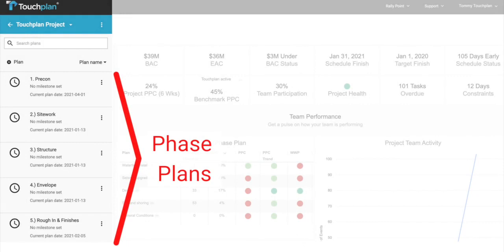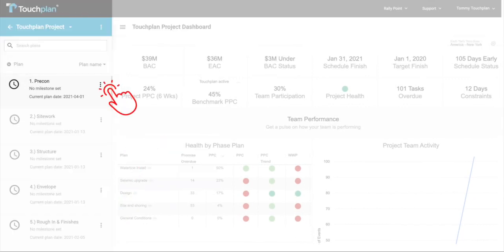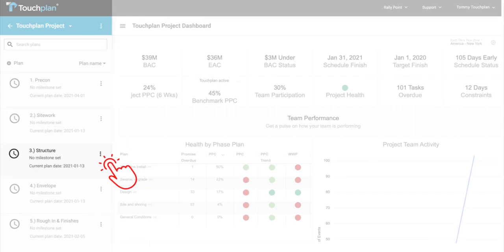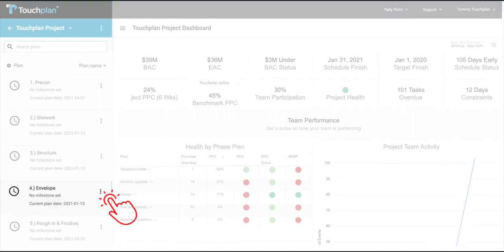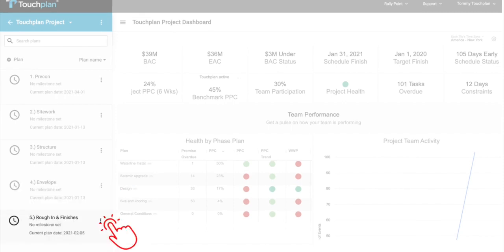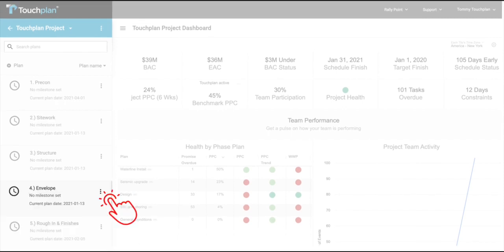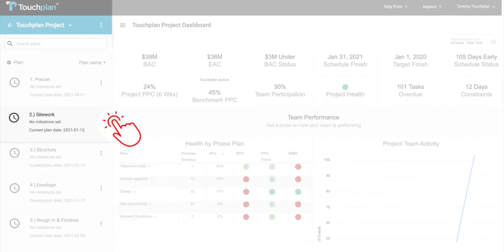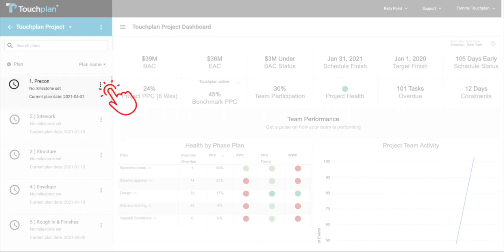Phase plans provide a way to divide up projects into digestible sections. These are typically organized by the construction phases of the project and are often built out in alignment with your work breakdown structure in your master schedule. Each phase plan represents a separate planning board, so we want to ensure that the setup of the plans makes it easy for trade partners working together on the job to plan together in the same phases.